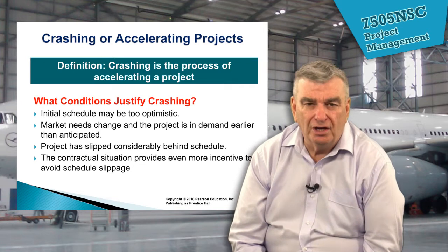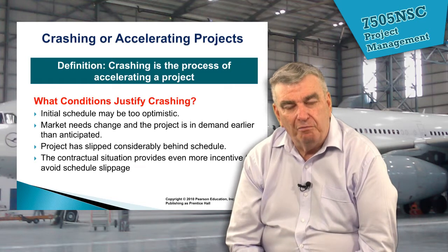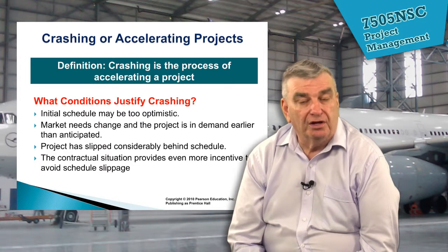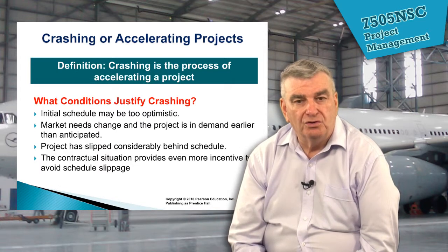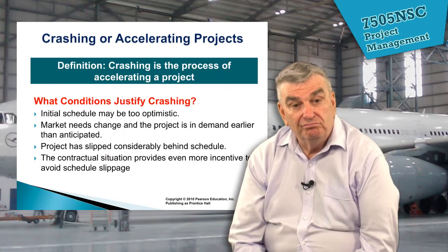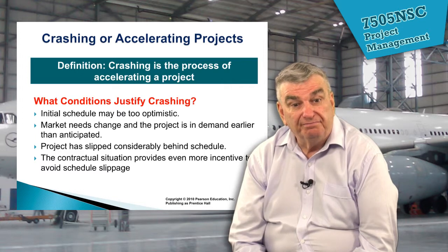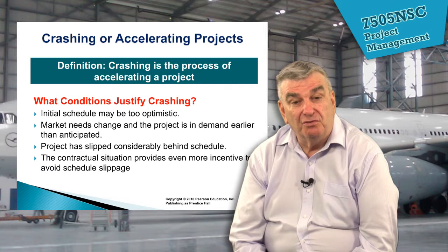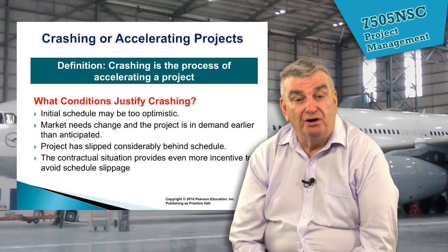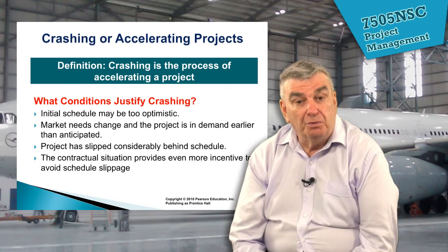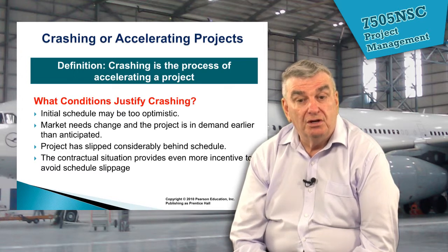Crashing or accelerating a project is a process of basically speeding the project up so we either can finish early, or if the project is already over time, we can bring it back to its original schedule. What conditions justify it? Well, first of all, the initial schedule may have been too optimistic. We just underestimated the time for different activities. Or market needs have changed and the project is required by the customer earlier than he or she originally said.